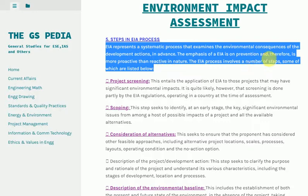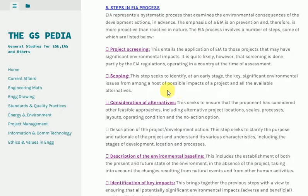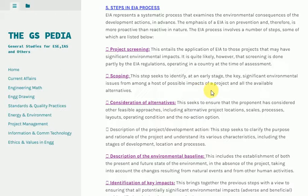Consideration of Alternatives: This seeks to ensure that the proponent has considered other feasible approaches, including alternative project locations, scales, processes, layouts, operating conditions, and the no-action option.